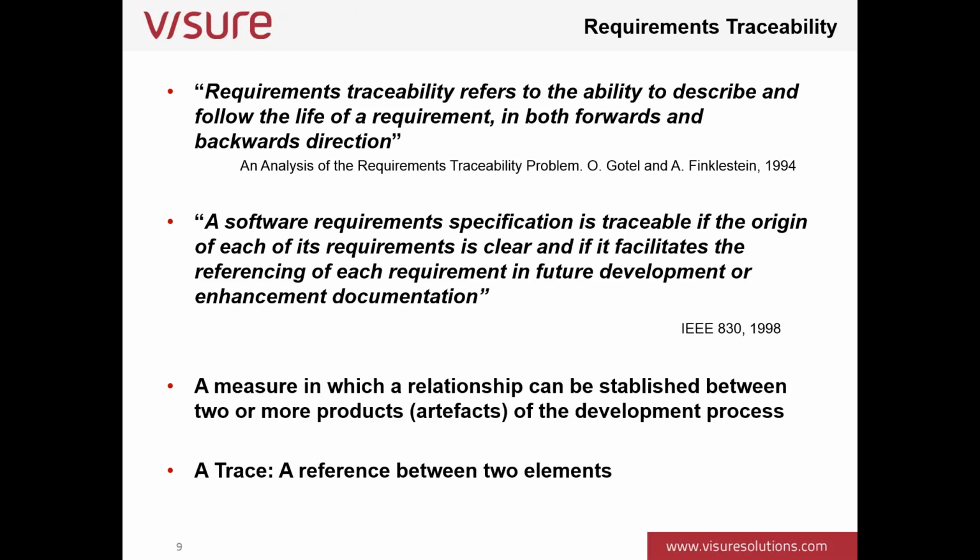We will be tracing requirements with other requirements, but also requirements with other artifacts: with tests, with bugs, with change requests, with design elements, even with code if we are coding, or things like that. So everything must be traced with the requirement. A trace, by the way, which is an important thing to define, is a reference between two elements.